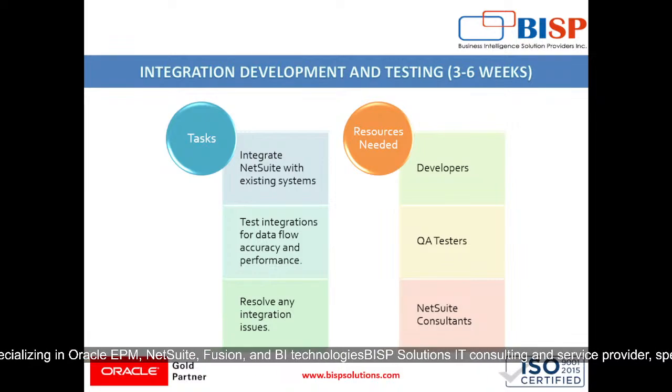Then integration development and testing will take around 3 to 6 weeks. The tasks involved are integrating NetSuite with existing systems, then testing integrations for data flow, accuracy and performance, and resolving any integration issues if there are any. Resources needed are developers, QA testers and NetSuite consultants.